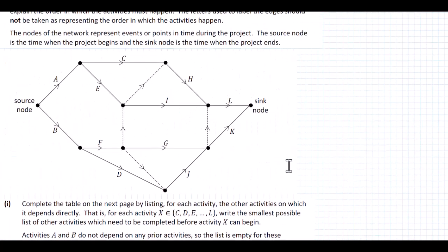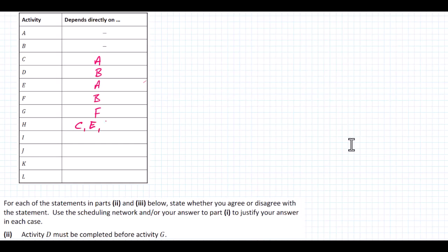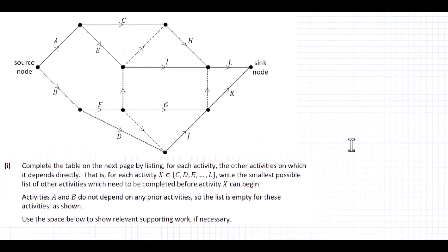Looking at H — H depends on C being completed. Because we have this dotted line here, it also depends on E being completed. And because we have a dotted line down along here, it's also going to depend on F being completed as well. So H depends on C, E, and F. I is next — I is dependent on E, and also because we have this dotted line down along here, it's going to be dependent on F as well. So I is dependent on E and F.